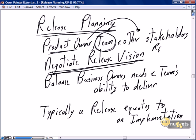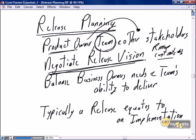As the product owner takes the roadmap and develops the release strategy, there may be input from organizational stakeholders because there will be a requirement to negotiate the release vision. For example, the roadmap said customer maintenance is number one, but after talking to the CIO, inventory management, financial control officers, and the audit department, we realize we're currently failing some financial audits.